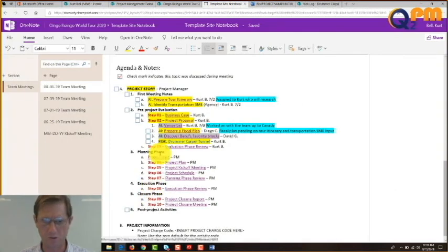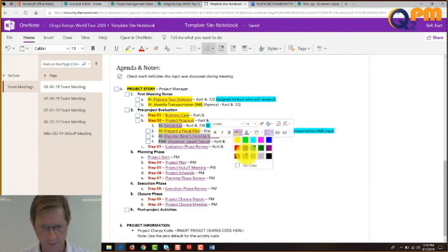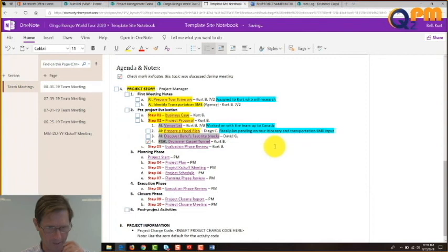Then I come back to the story, and ta-da! I mark it as there. Do I remove the checkbox? No, why not? Because you want to include it in your report later. That's right. Keep the checkbox there. You'll deselect the checkbox in the next one, but you want to leave it there until you do your next status report. That's how you know that that's the stuff you have to report on your status report.